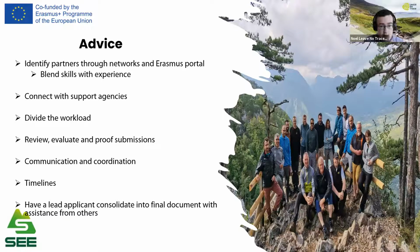The main learning that we had was that for projects like this, it was essential to have good governance and policies set in place with all of our partners and agreed before it could take place. So we developed partnership agreements, and we developed code of ethics and governance policies that you might have developed for your organization, but we also felt it was important to develop them specifically for the project, so everyone is aware of what is happening. Everyone is aware of the agreed code of conduct, our governance code, and our risk management. This was part of my job, making sure that every partner is aware of the organization and what needs to be done.